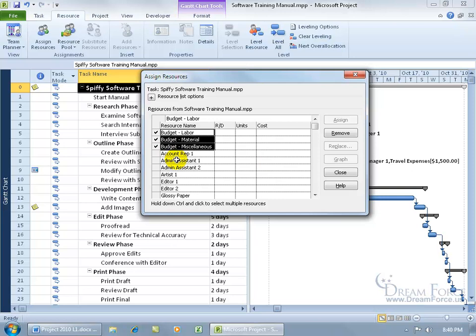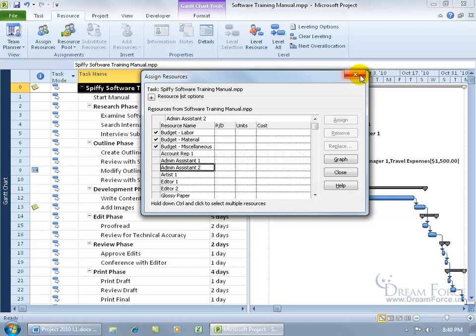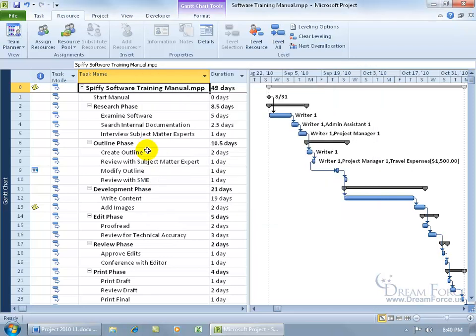As a side note, you cannot assign any other resource that's not a budget resource to the project summary task. You can go ahead and select one and try to assign it, but the button's not available. Let me go ahead and close out.